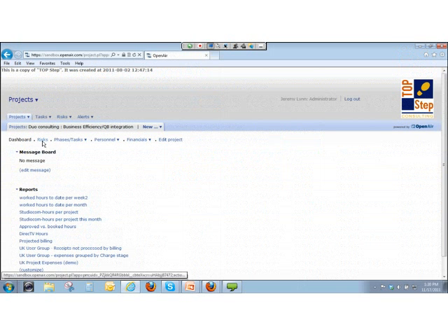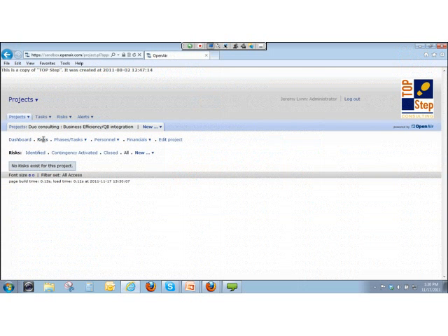So in the risk documents, I've identified stages for risks: what risks have been identified, what risks have already turned into an issue, so we're activating the contingency plan perhaps, and what risks have been closed because they've been fully avoided. And if I just create a new risk, you can see what the form would look like.